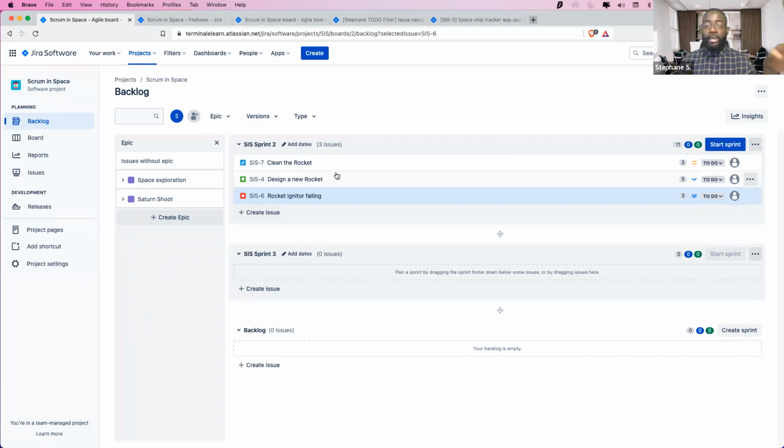Now we look at the backlog and we look at the priorities. First, highest priority is 5 points. Second one is 10. We take all those till we get to 24 points worth of stories. That's what we move into the sprint. Does that make sense? Yes. Okay. All right. So now we completed the sprint. We're planning for the second one.